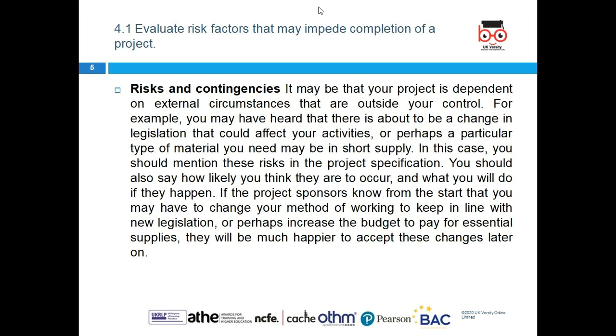So if we are expecting severe weather in the next 3 months, or due to this coronavirus the supply chain will be disturbed, we need a contingent plan. What do we do? Maybe we can't do the outside work, but maybe we do inside work. A lot of construction companies are still doing work. They have not totally stopped, but some of the supply chain or some work is available, those activities. So we need to always make a second plan,